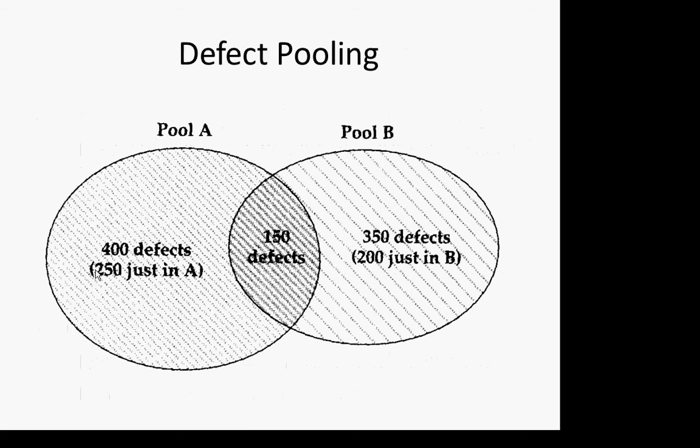So the idea here, folks, is that you have 2 teams working ideally in parallel at the same time without communication. Say a bug party, 3 hours, in different areas of space, one on one side of the big lab, one over in the area closer to the entrance, and they're working at the same time trying to find defects in your code base. 3 hours. One team finds, well, this would be pretty aggressive, 350 defects, the other finds 400.